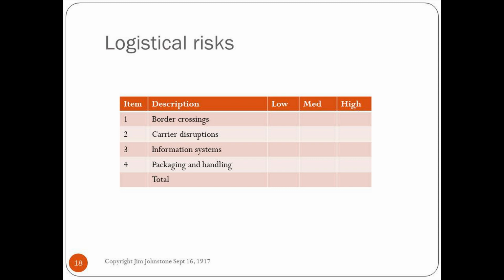Still wasn't as much as we needed, but at least we knew where the problems were now, which step was causing us the problems. We then dispatched our special process engineers to work with the suppliers that were having the difficulty. They were able to help them clean up their processes and have a more predictable yield and a more predictable final shipment into our factory in Austin. So distance creates problems just in the communication of information and in managing the flow of the pipeline.